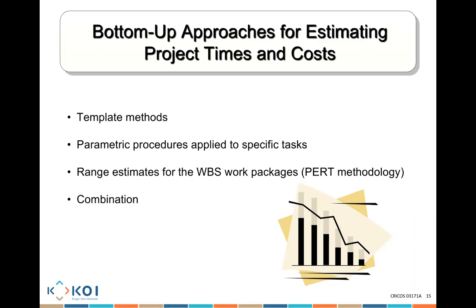You're going to say, okay, this is my big house. This is my big software. Let's think about each area. Let's think about business analysts. Let's think about testing. Let's think about development. Let's think about project management. You go into detail about how much each of these areas is going to cost me, not the high-level area, but each area within my project. Okay, I need 100 hours of project management. Each hour of project management will cost me $100. That's $10,000. So you go to the detail of each specific thing that is going to be needed when it comes to getting the bottom-up estimates.